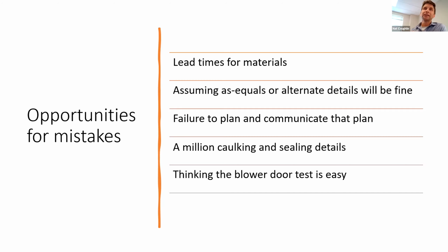So all of a sudden, we're realizing that you have to think about your window submittals at the same time you're doing your rebar submittals. Like day one, you really should be submitting your windows and doors because things will come up and that process can take a long time.